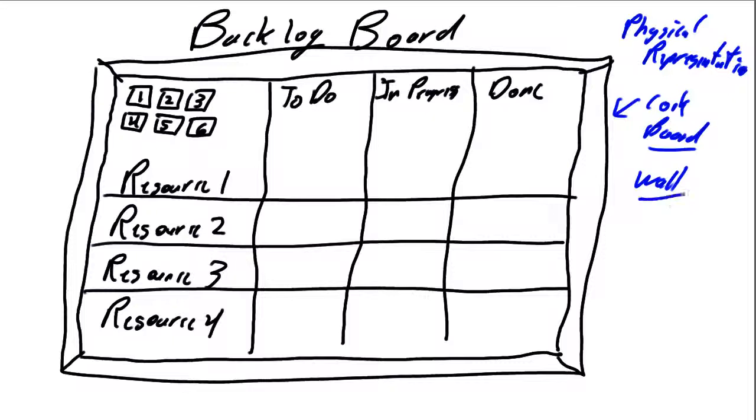It would be set up in a structure such as this. The key is to identify the stories that need to be worked on, the stories that are in progress, and the stories that are done.